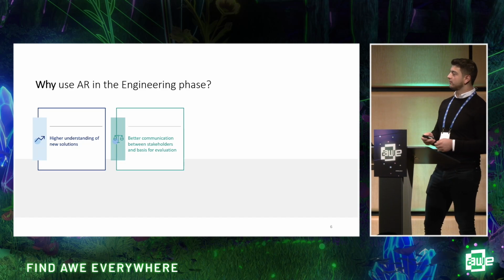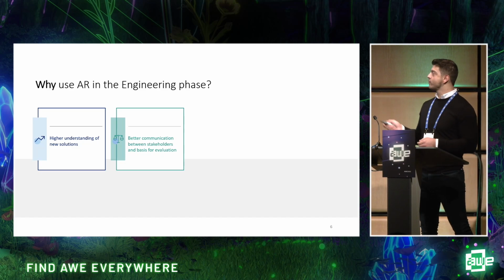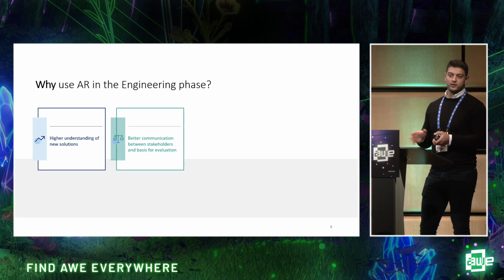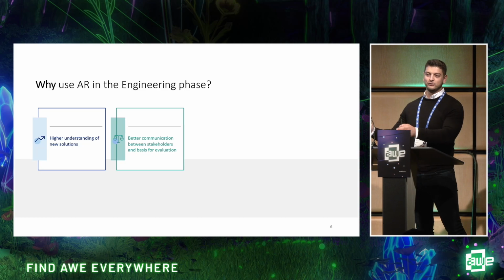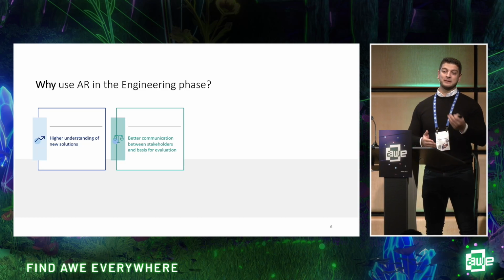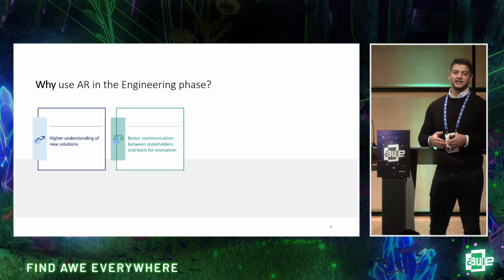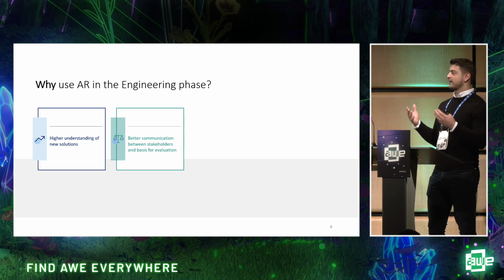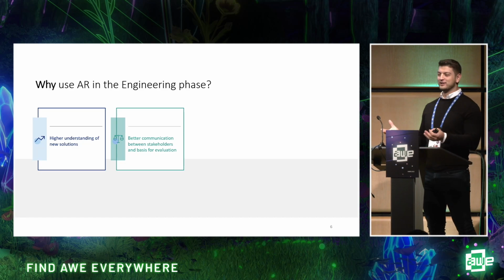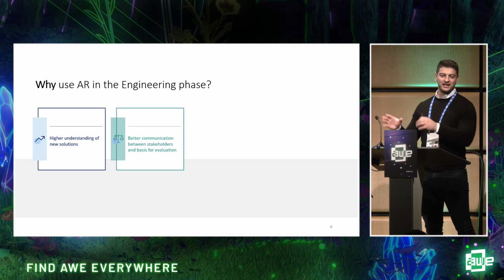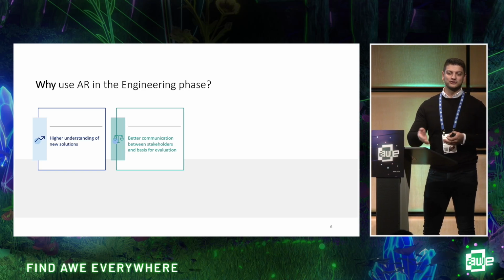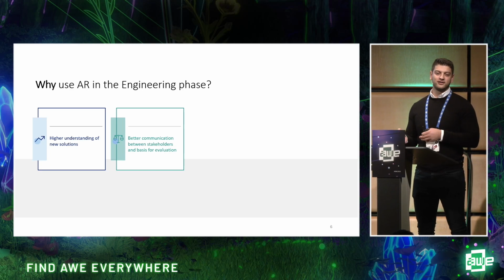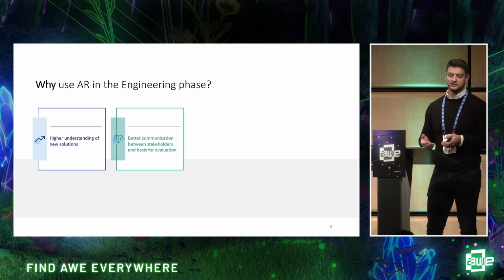Then the other point, the basis for evaluation. The way that we do design reviews is not just by showcasing it to the end users. We have done that, and we have made mistakes by that, because it turned out that the end users thought it was really, really cool with the animations. They actually didn't get to understand the solution, so they signed off on something that later on became an issue, and we had to change it.